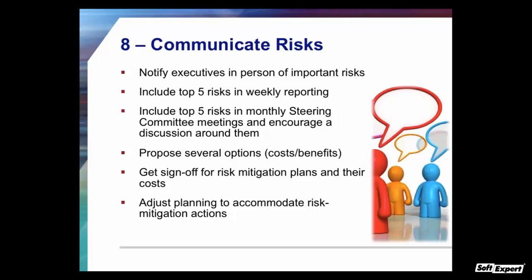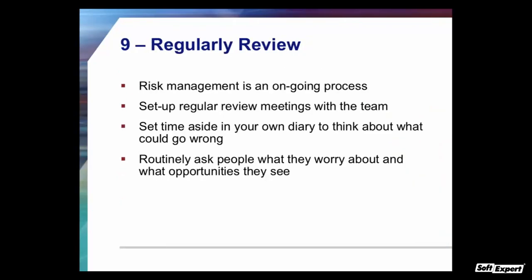The ninth step is to regularly review your risks. Far too many project managers create a risk register and then never look at it again — but that is utterly pointless. Risks will keep cropping up, so you need to keep having risk workshops and reviewing your risk logs. Have review meetings with the team and set time aside in your own diary to look at what could go wrong. Routinely ask people what they worry about and what opportunities they see — maybe avoid using the word 'risk' and instead ask what's holding them up.